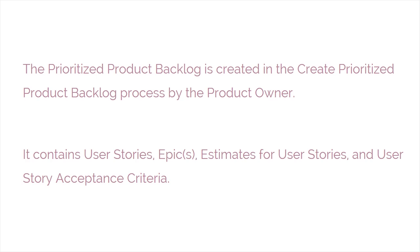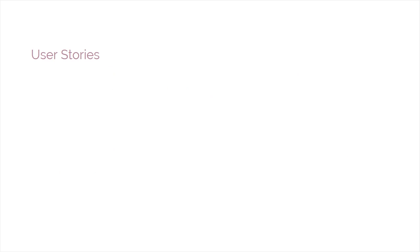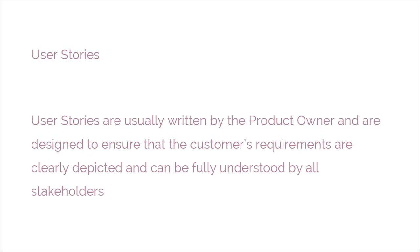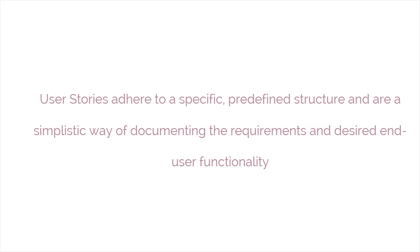The prioritized product backlog contains user stories, epics, estimates for user stories, and user story acceptance criteria. User stories are usually written by the product owner and are designed to ensure that the customer's requirements are clearly depicted and can be fully understood by all stakeholders. User stories adhere to a specific, predefined structure and are a simplistic way of documenting the requirements and desired end-user functionality.